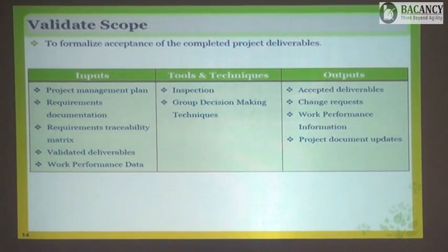As per the best practices, as per the standard, you are not allowed to take a decision on your own, even if it results in cost saving for the customer or the organization. Strictly no. We can send a request to them, isn't it? You will have to send a variation request. It will have to follow through the change control process. You can dare do anything that you want, but you will have to follow the processes. I am not saying don't change it, but do it the way it is advised in PMBOK.